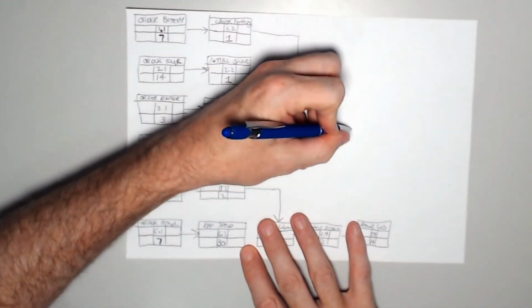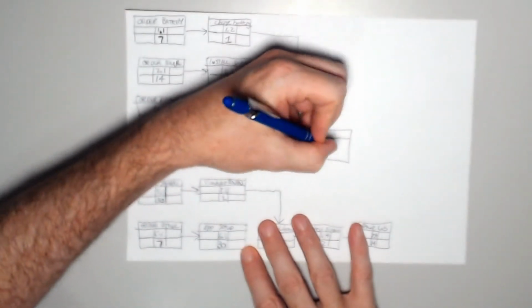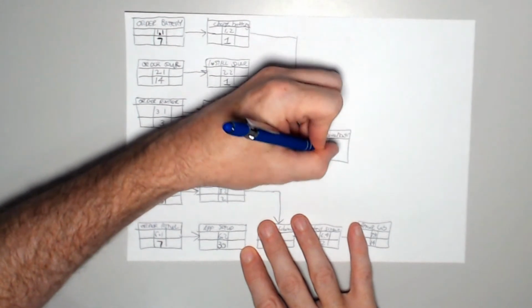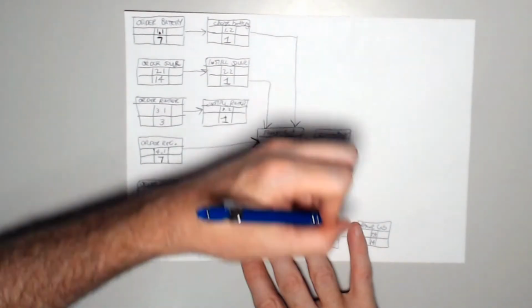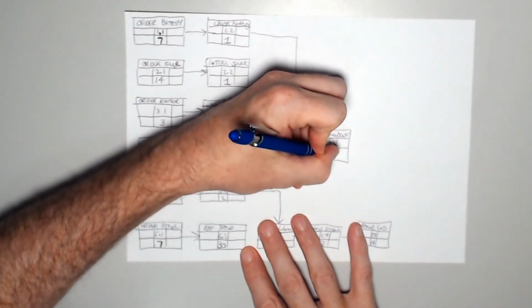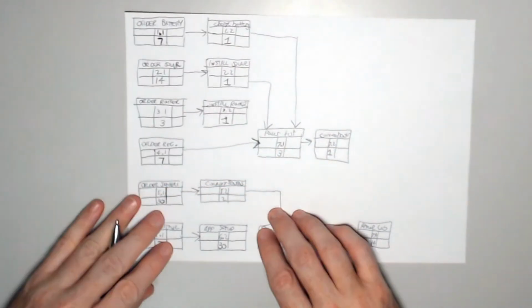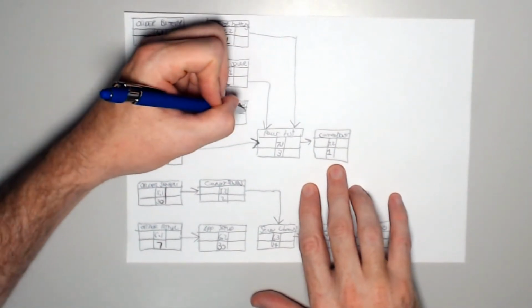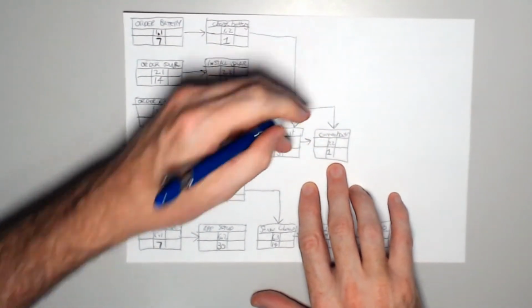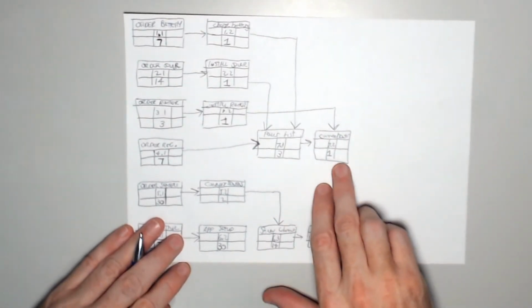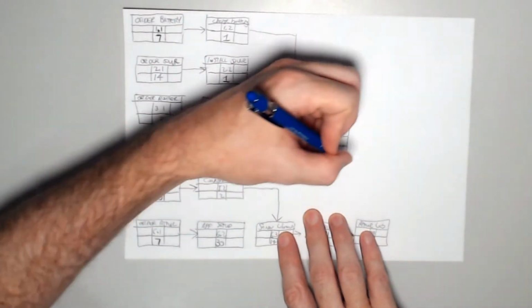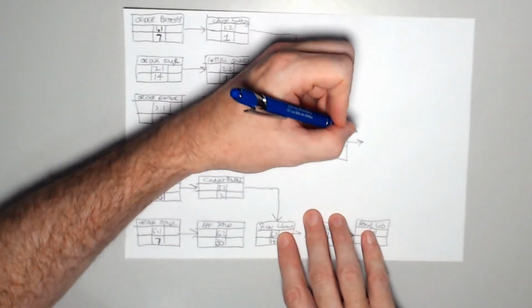Next off, we're going to connect the router. And that was task 7.2. That's going to be fast. It's going to take 1 day. So that's done after our power test. And to do that, we need to have the router ready to go, installed. And so we've got our router connected to our solar, our battery, and our regulator. So we can now do our field test.